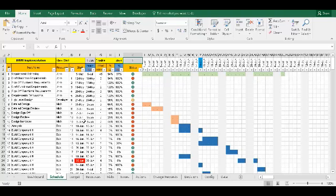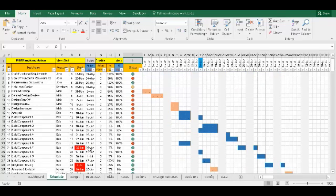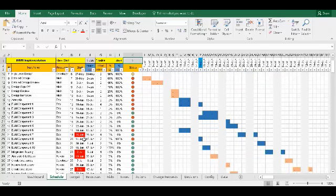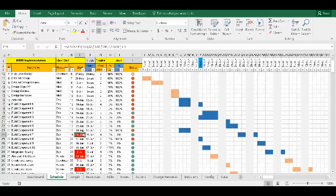Another feature is that you can see some of these dates are highlighted in red. So this is to indicate that these dates fall on a weekend. You should probably look at your tasks to see if you can move the dates around. So that was the schedule.